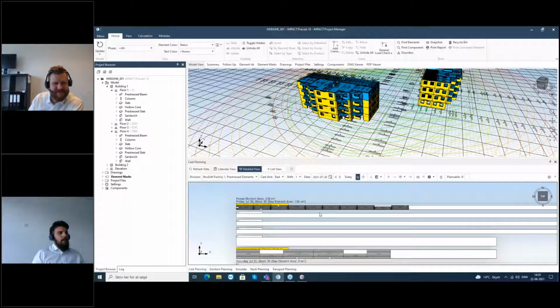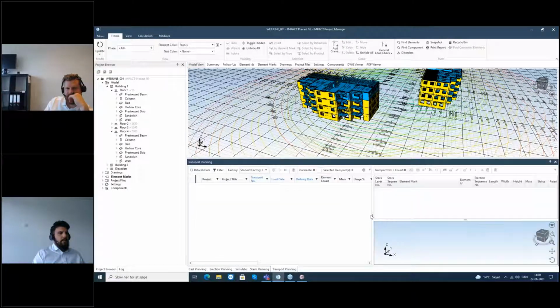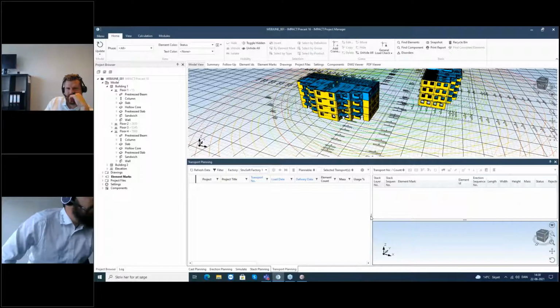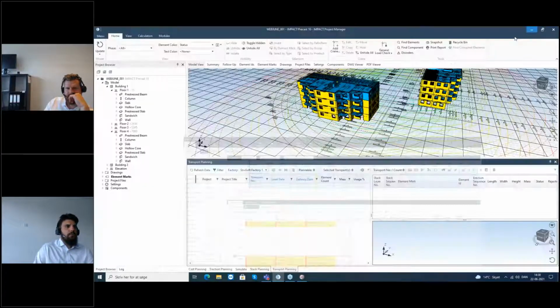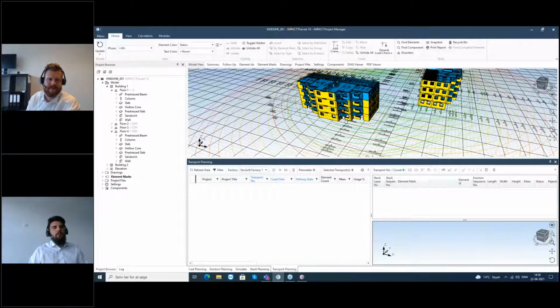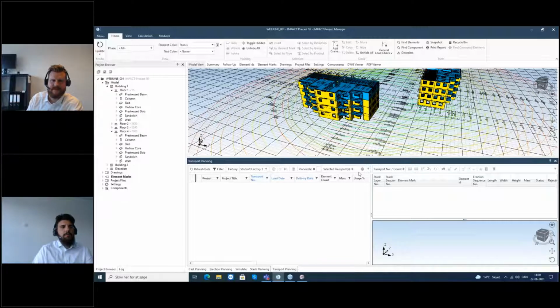And on top of all that, I will play another little role, meaning that, again, I love this role playing in our webinars. So I'll do a little bit of transfer planning. I suppose some of you who have been in the previous webinars have seen something like that, but usually what I like to do is do the transfer planning per project. I can do it per multiple projects, but it doesn't really make any sense to plan in the same order transports from multiple projects, because of course the elements are not going to go to the same construction site, right?